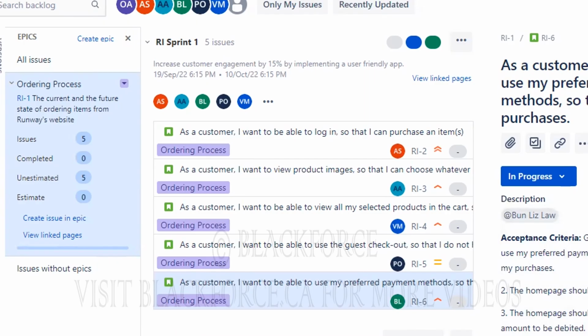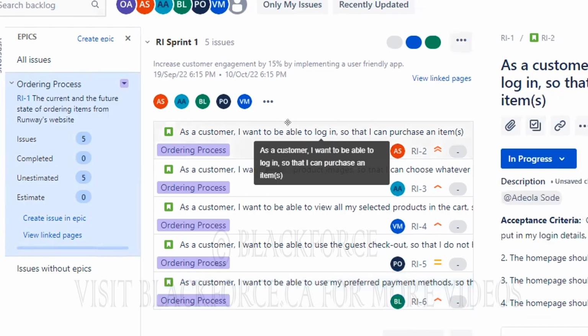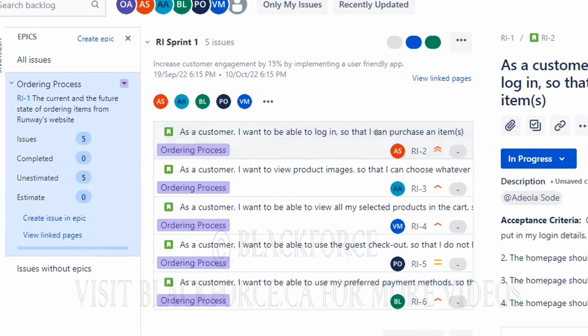So as being displayed on my screen, user story 1 is ranked as being given the highest priority, as it is essential for our customers to log in before they can interact with the system at all. Hence, all login issues need to be fixed first. So I would pass on now to Victoria, who will be talking about our sprint creation, activities in the current sprint, and the progress that is being made in our current sprint. So she would also conclude the presentation. Thank you. So over to you, Victoria.